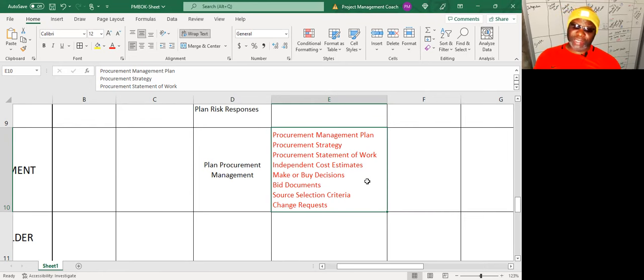When I see her estimate, I'll know if yours is in line. If she's telling me, yeah, it should be around the region of 12, then okay, good. But if she says, no, you're right, Phil, it should be in the region of 5 or 6 at most, then I need to understand, okay, where did Firuz get it wrong? Where is she seeing the scope of work differently? So it's just an independent estimate from a third party.